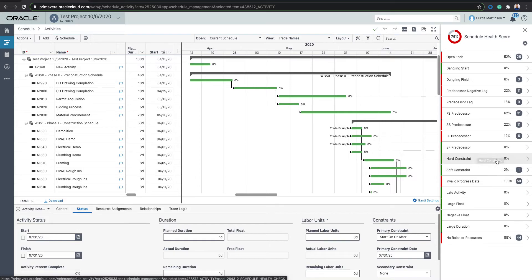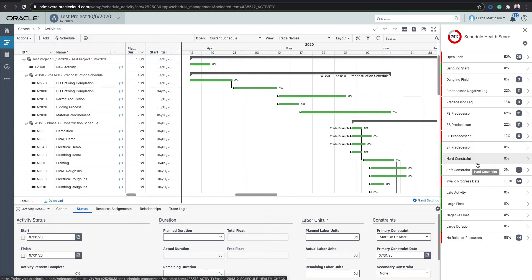The big one being constraints. If you have a schedule that's acting weird and you're trying to run it and stuff is not moving where you want it to, it might be because you have constraints applied that you don't know about. If you open that up, it'll display here.